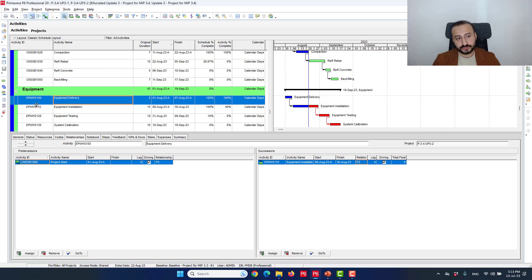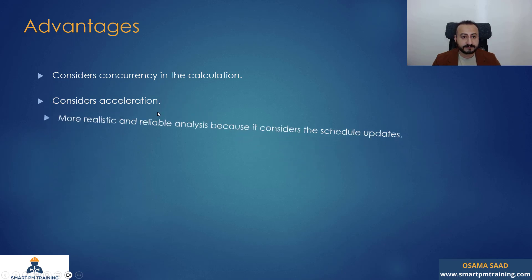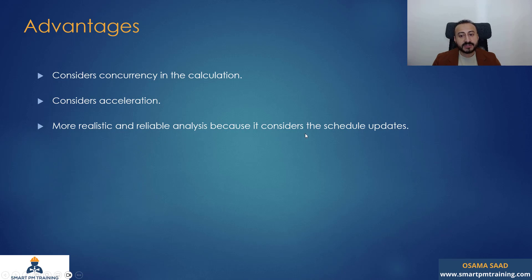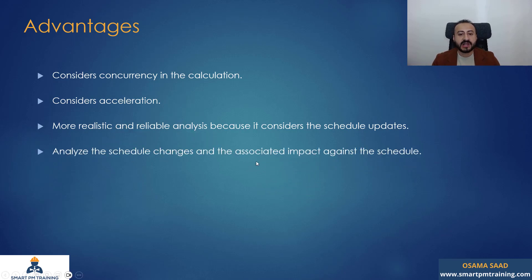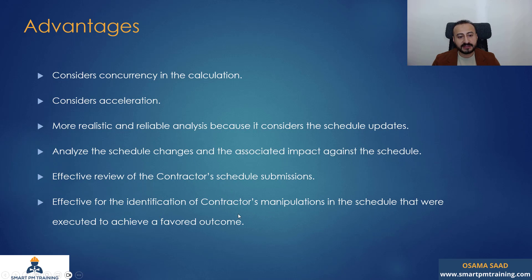So there are many questions here, and that's the purpose of this method. The advantages: it can consider concurrency in the calculation because you have a window analysis, so it is easy to see how the contractor is progressing throughout the project and determine concurrent delays. It will consider acceleration as well. It's more realistic and reliable because it considers schedule updates and any shifting in the critical path. It analyzes schedule changes and their associated impact, and enables effective review of the contractor's schedule submissions and identification of contractor manipulations to achieve a favored outcome.